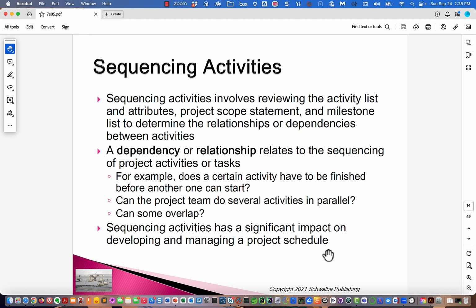Okay. So typically, when we're defining the dependencies, we're defining the ones where we have to finish A before we start B, not because we don't have enough staff to do B, but because according to the way that we work on our project, we believe that tasks like A need to be finished before we start tasks like B, without regard to workload and staffing. Okay.